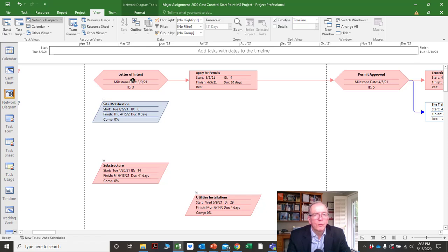'Apply for permits' is at the activity level — the lowest level of the work breakdown structure. You'll notice none of the parallelograms are connected, and that's how it should be. Best practice is not to connect headings to activities.